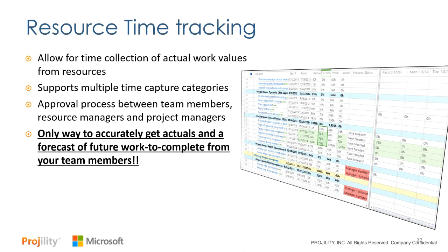But at some point, you have to get time collection. A lot of folks push back on this a little bit and say, well, we're not ready for time collection. Well, the reality is if you want to do detailed resource analysis and capacity planning, you have to capture time. And you have to capture time at either a project or a detailed task level. You can do both in the system, but the idea is you do time tracking in your project management system, which gives you the actuals. It allows you to forecast future where you're going to finish, and then you get your team members involved in the entire process. This can be a change if organizations don't have people tracking time today, but it's really one of the only ways to actually get your actuals.